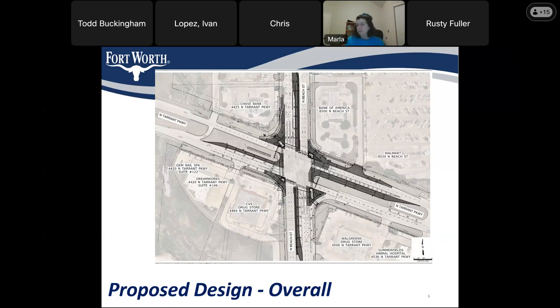Okay, because we're having a terrible time getting these certain things. And anywhere we can make use of the ones we take down, the better, because the lead time on these new arms and poles is just absolutely absurd. I'm sure it's necessary, but it's 8 to 10 months to get those kinds of poles and arms. The city uses those for lockdown locations. Okay.